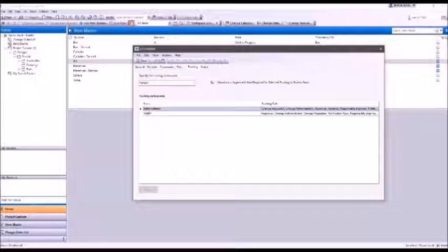Somebody puts it into the system and it just gets put in the system. Then somebody's got to say, actually, yes, that's the problem. A qualified person says, yes, make that change. Then a CAD person makes the change. Then another qualified person approves the change. And you go through that step.